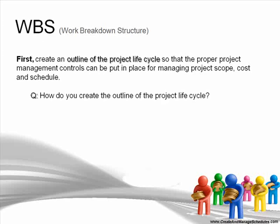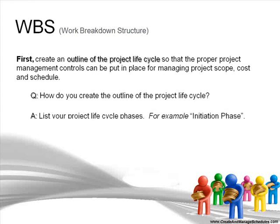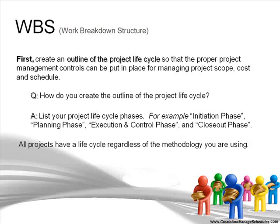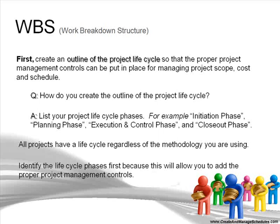How do you create the outline for the project lifecycle? By listing the project lifecycle phases — for example, initiation phase, planning phase, execution and control, and closeout phase. All projects have a lifecycle, regardless of the methodology you're using.